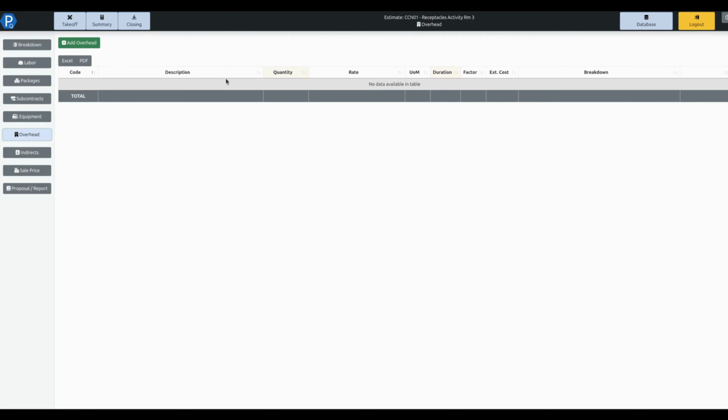Overheads. Now this is something that you can plug in your template. If you create a change order template, it depends really on what the project contract allows for these. Some will allow you to have specific percentages for this. Others will give you specific items you can include, exclude. There's a number of different pieces in here.